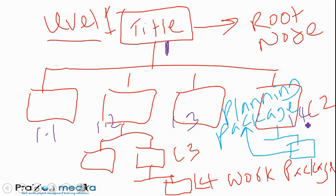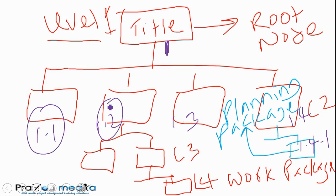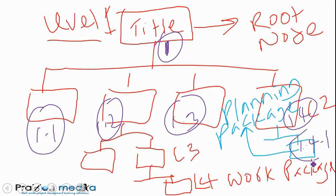In this instance, the planning package we would name 1.4.1. I know this image is all over the place, but just follow along, rewind if you need to. This numbering scheme of the work breakdown structure is known as a code of accounts. All these numbers I'm circling here are known as code of accounts.